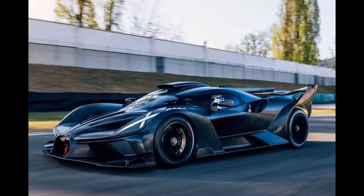Actual costs, $97,235: parts, $92,735; labor, $4,500. Under budget analysis, Larry Jeffers Race Cars achieved a positive variance of $2,765. They analyze the reasons for coming in under budget: efficient parts sourcing through bulk discounts with their primary supplier; utilizing a junior mechanic for some of the labor tasks under close supervision; and avoiding late fees at the racetrack.